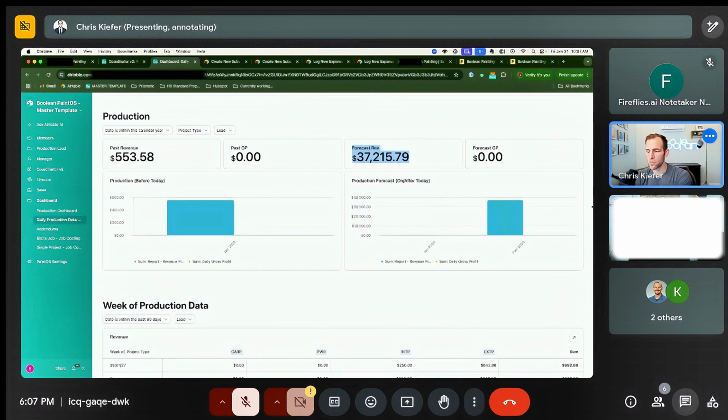And this is where, Ryan, in my opinion, every job that gets sold, you want to give it some sort of date in the future. You might not move it to ready because there are still some things that have to be confirmed or whatever. But if you can put the start and end dates approximately in the right spot, that's what's going to allow you to see, oh, we still need to get $50,000 more of revenue in April in order to hit our revenue for the year. And then as it gets closer, you adjust the dates and your reporting adjusts as well.